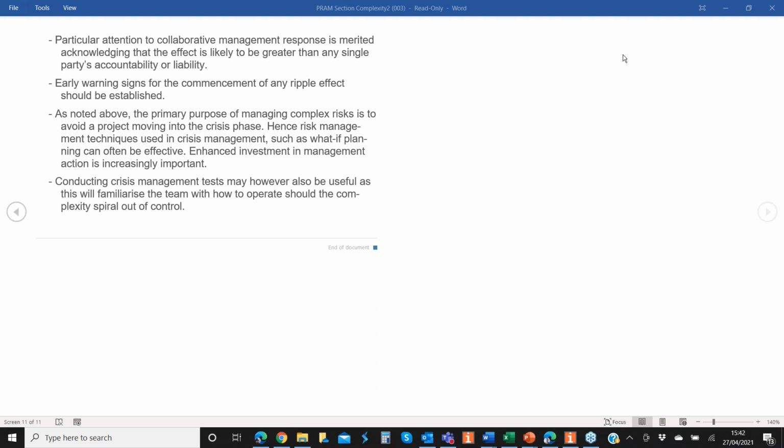Yes, absolutely. Can I ask a bit of a basic question? I'm scanning through the PDF document. Are we using the word risk in its appropriate form, as equal to threats and opportunities? There hasn't been a mention of the word opportunity specifically, and I'm hoping that risk constitutes both, because opportunities emerge from a complex situation as well. I think it's an innate human tendency that when one's writing about risk, one thinks of just the threat side. But I don't think anywhere I've been overt on that. I will double check it.